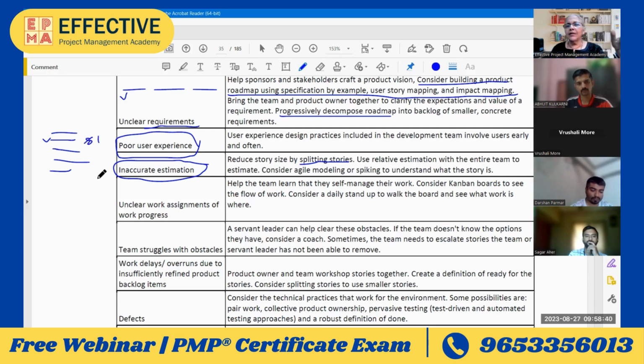Then do relatively. Story number 2 is our base. Story number 1, how complex is it compared to story number 2? It is 4 times complex, is what we think. So let us say that it takes 4 days. We don't need to spend too much time. We will have some good rough idea. That is how, if you estimate relatively, you don't need to spend so much time. You compare the stories based on their complexities, and the estimates will be improved.